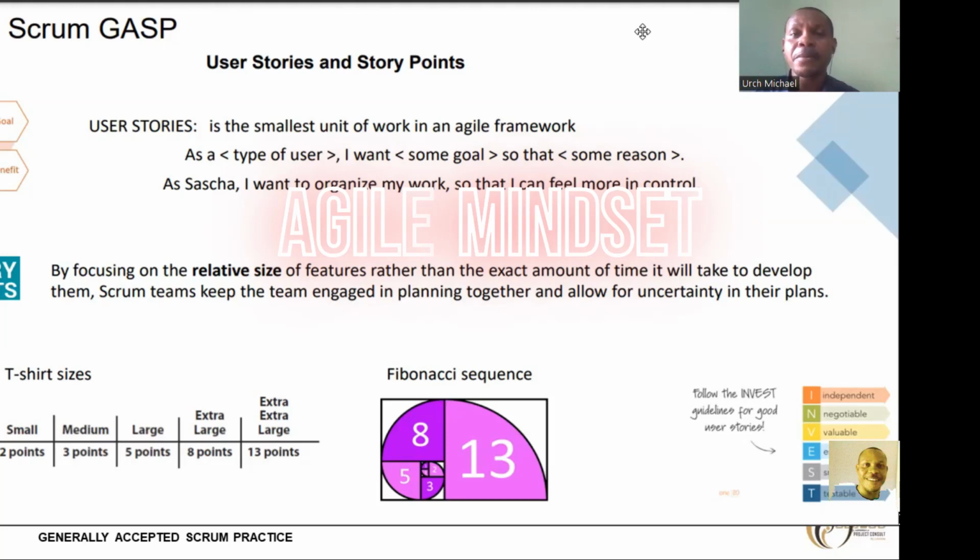Then you're asking yourself, which one is more difficult to do? Is the excavation too difficult for me? I'm going to grade it. If it's not too difficult for me to excavate and do my setting outs, then I'm going to put that under extra small. If casting is more difficult than excavation, I'm going to give it small.